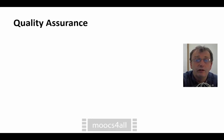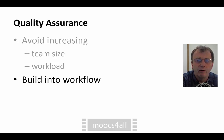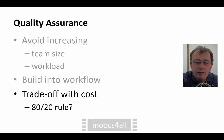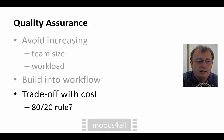A few words on quality assurance: first, avoid increasing the team size and workload. The fewer people involved, the less communication overhead and the less workload. So let's build quality assurance into the workflow so those tasks are carried out by the people already involved in the process. Also, let's accept that there's going to be a trade-off with cost and that we may have to take some impact on quality — but we may be able to get a very good level of quality, say 80% of the quality we want, with only 20% of the effort.